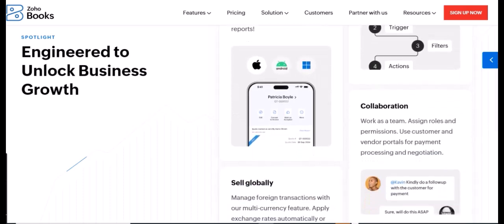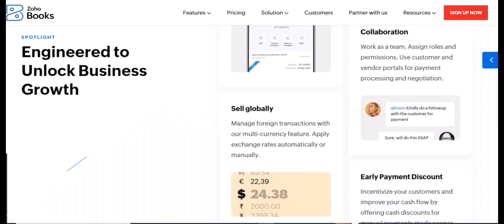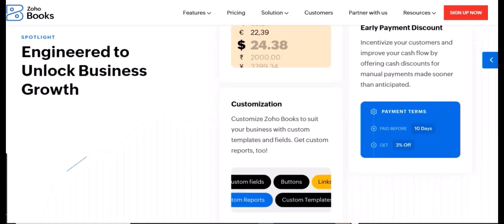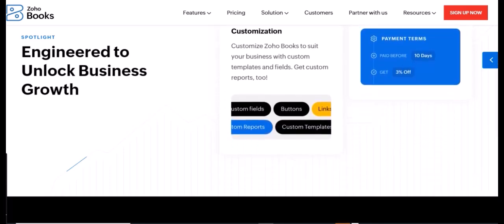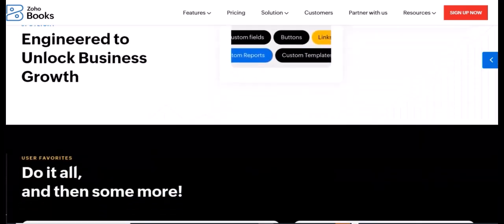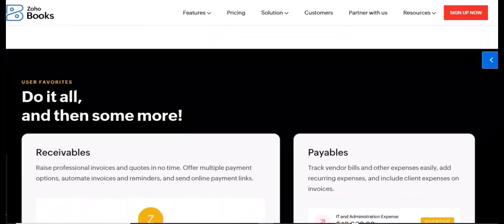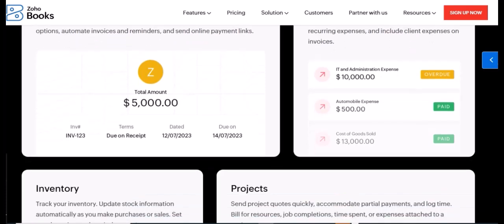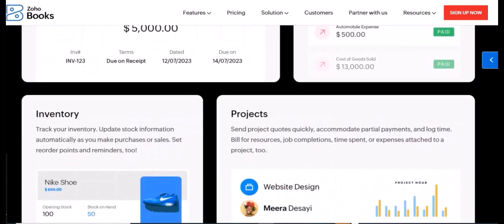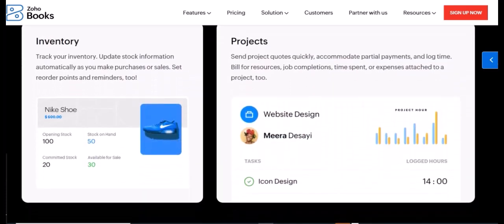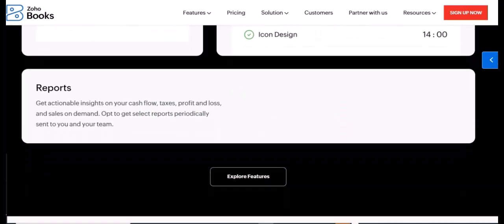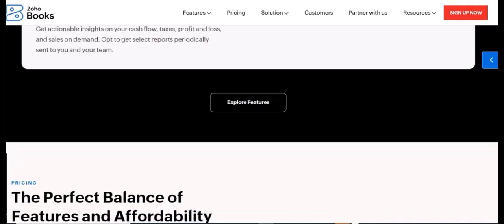3. Comprehensive time tracking and reporting. For any project-based business, particularly service-oriented ones, accurate time tracking is paramount for billing clients, monitoring team productivity, and staying within budget. Zoho Projects offers robust tools in this area. Timesheets, easy logging of billable and non-billable hours, either manually or using built-in timers. This data can then be used for invoicing.